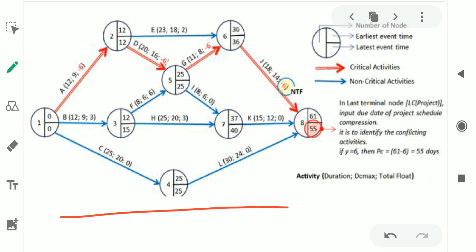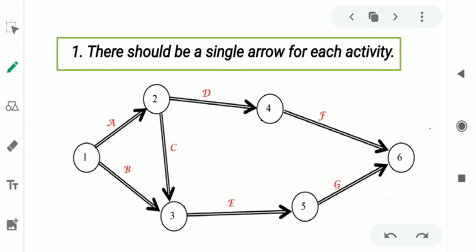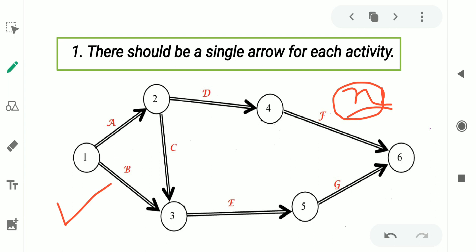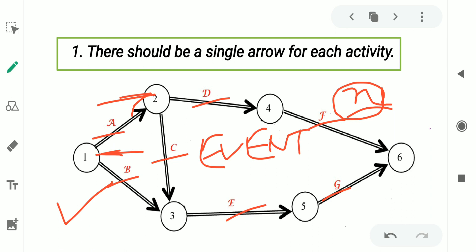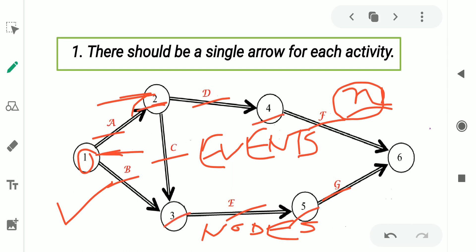To draw a CPM network in an error-free way, we need to know some basic rules. The first rule is there should be a single arrow for each activity. If a particular project network has n numbers of activities, then we have to draw n numbers of arrows. This particular project network has seven activities — A, B, C, G, E, F, G — so we have drawn seven arrows. These circles are called events or nodes, and the numbers 1, 2, 3, 4, 5, 6 are called event numbers or node numbers.